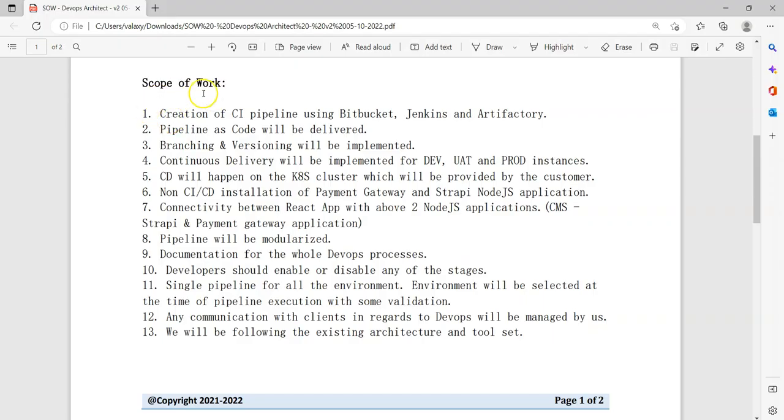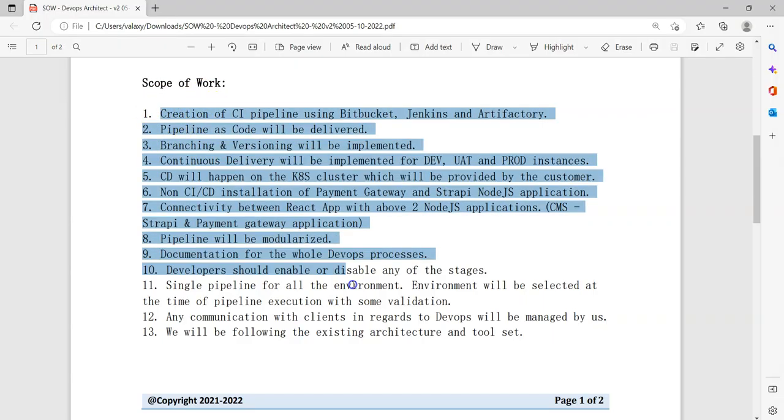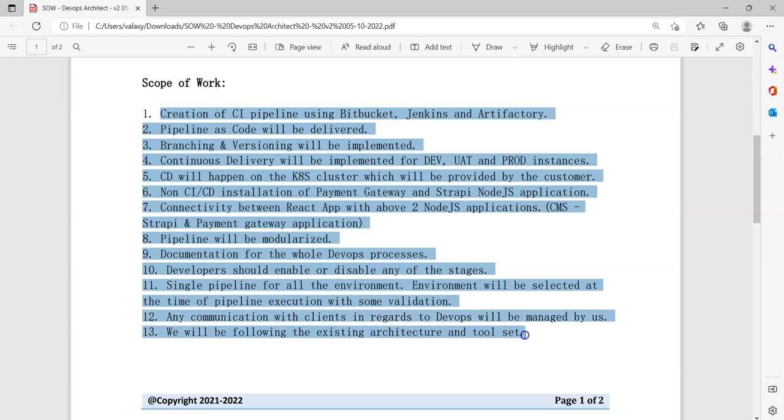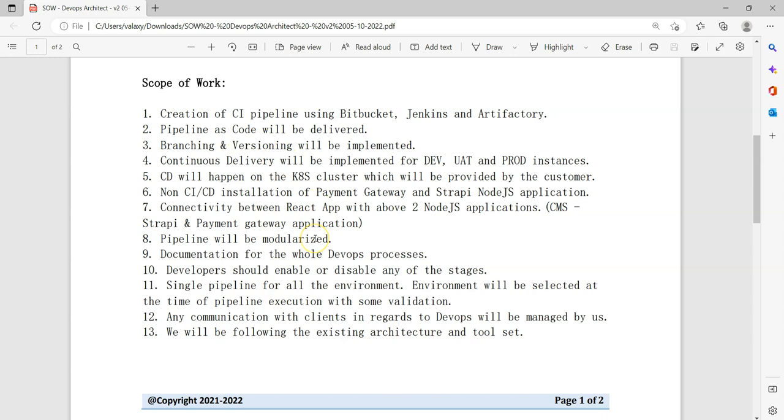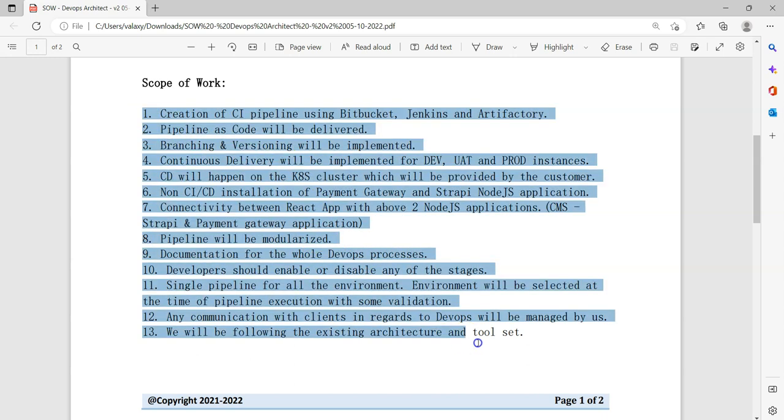So if you see the Scope of Work, these are the points we have mentioned that we are agreed to deliver. As part of this, we are using various tools like Bitbucket, Jenkins, Artifactory, even Kubernetes, and we need to write code as a pipeline. Branching and versioning, all these things we need to implement as part of the solution. Now while delivering our project, he will validate all these points have been delivered as part of the project or not.